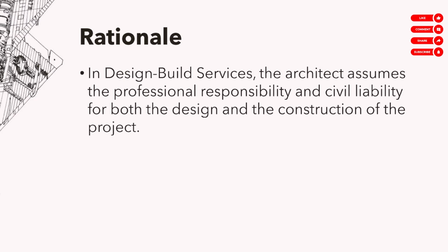Okay? In design build services, the architect assumes the professional responsibility and civil liability for both the design and the construction of the project. This is obvious, this is common sense. Wala ka nang kawala sa civil liability kapag design build. Kasi, iba sa civil code, ano lang naman yan eh. Kung hindi designer, contractor daw. Wala ka nang kawala because now you're both the designer and the contractor. Kapag ang problema is design, it's your fault. Pag ang problema is construction, it's your fault.